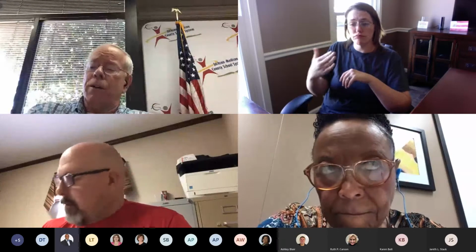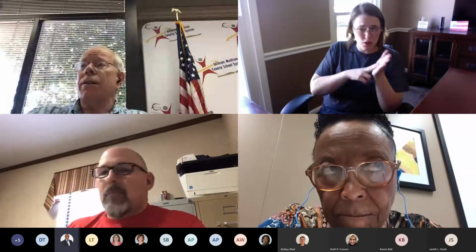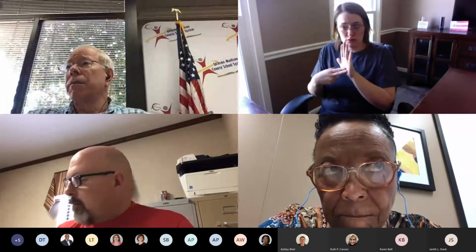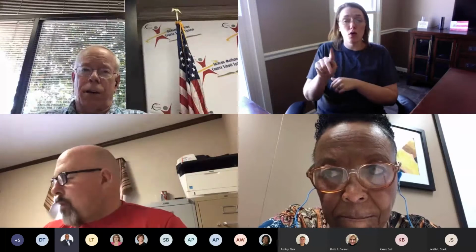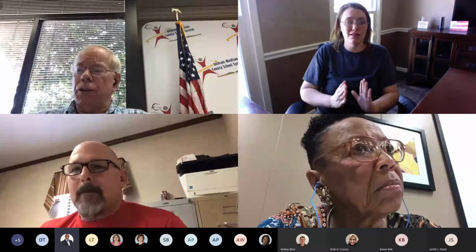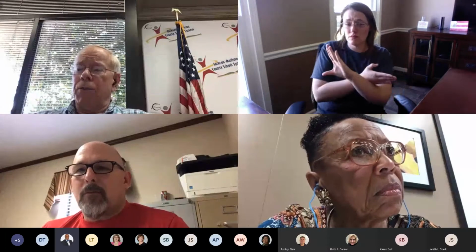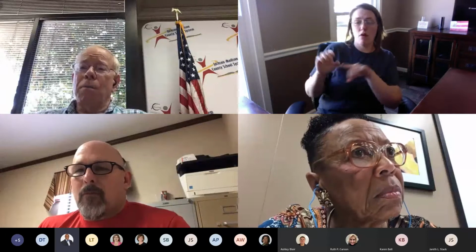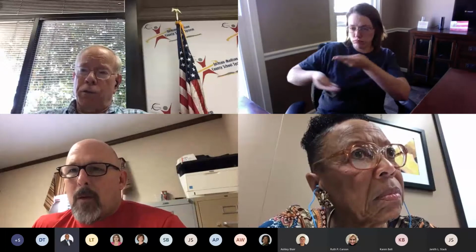But I would point out one thing. I think Dale has done a good job of integrating this contract with the architect's contract. Is that right, Dale? Yes. If you look at Article 5, that's coordinated with the architect's contract. So at each stage of the pre-construction, we get feedback from the CM on budget and also on schedule.